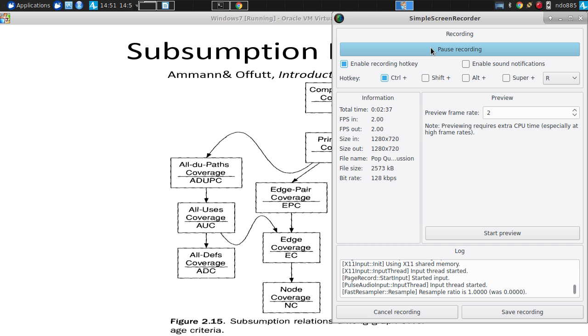By contrast, mitigation is a matter of investing now, like undertaking actions now other than just planning. Those actions that we undertake now are investments to allow what to happen? Why do we undertake actions in mitigation? To reduce the chances that a risk occurs. Yes. So a big thing is reducing the chance that it occurs. But it's not the only thing. What's the other thing too? We undertake actions to reduce the damage. If it does come about, if it, despite our efforts, does happen, then it'll do less damage. So the net effect is to reduce risk exposure.